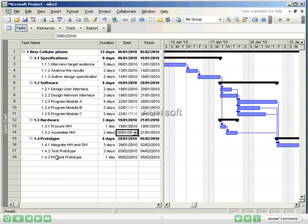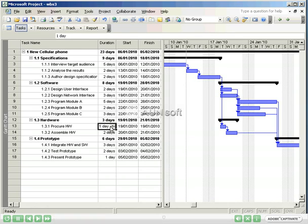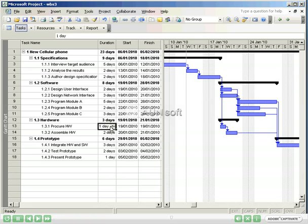You may be tempted to include five more days in the duration column. This would be a mistake, because it would imply that the task takes six days. Later, when we assign resources, the resource assigned to this task will be seen to be busy with this task for the full six days, rather than working on the task for one day and waiting for five. The method used to address this requirement to wait for something is called lag.